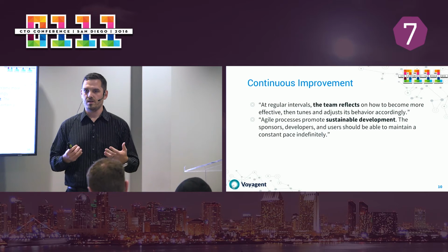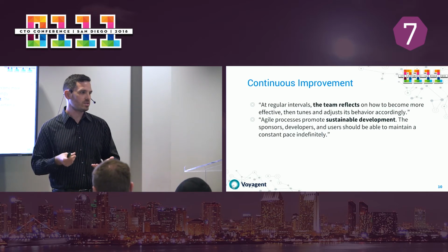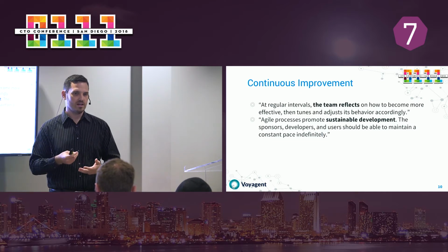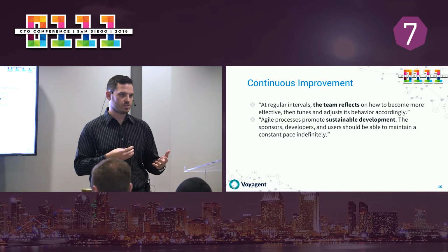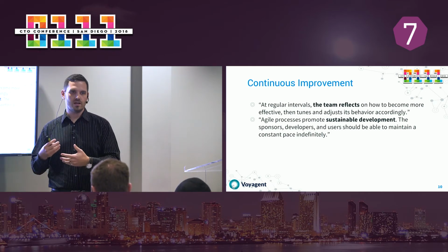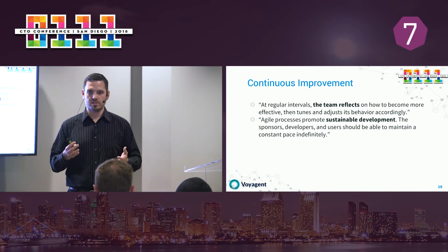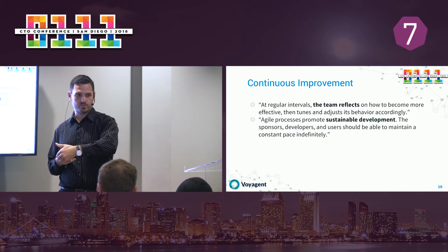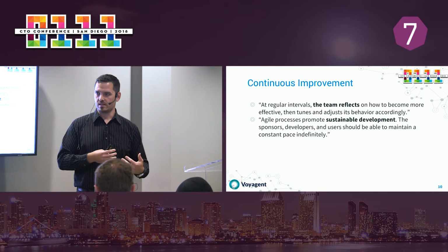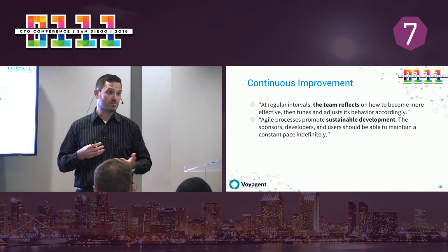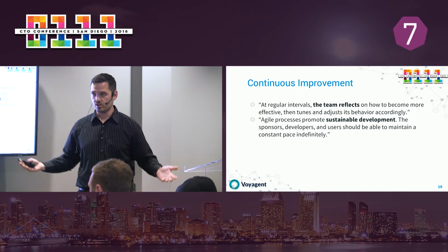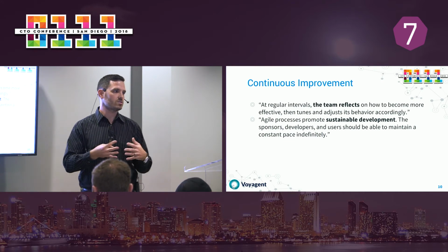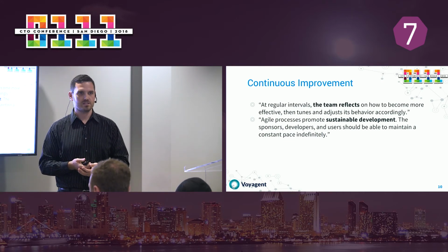So everything that comes up, that is your opportunity to brainstorm solutions. And then somebody owns it, and that work goes into the backlog. And whatever it is, whether it's a change in process, change in communication, investing in a tool, what have you, you actually strive to get it done and you hold people accountable to it. And then when you get to the next retrospective, you actually go back to what was done last time and you measure the impact. And if something was successful, you keep it and you spread it around the organization. And if it wasn't successful, you kill it and you spread that around the organization so that the good ideas survive and thrive and the bad ideas disappear.